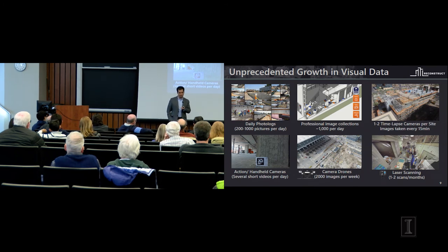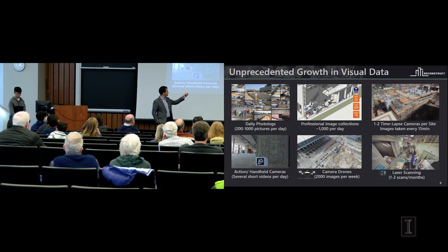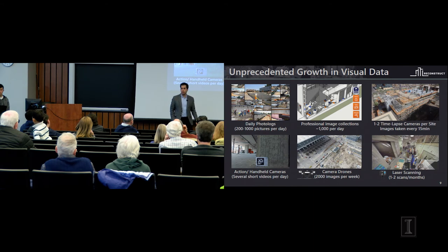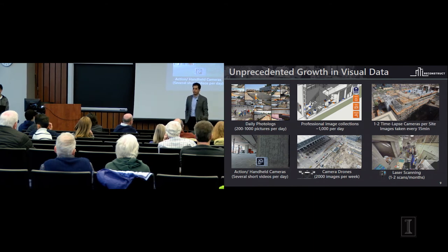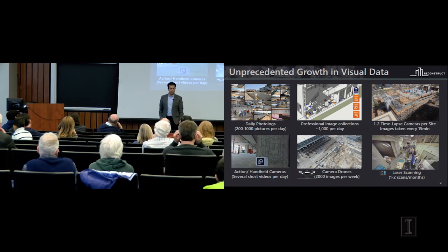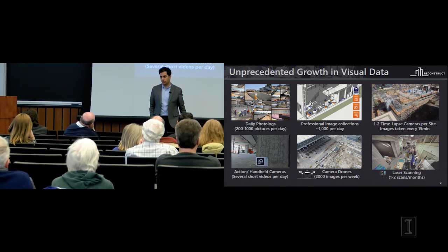It's a great question. So the question is, can this be used in court to make a case about who was behind schedule and the root causes for performance problems? Absolutely, yes. That's one of the reasons that you see professional image collection happening on the job site, because contractors and owners always want to have a visual recording of what is happening on the job site. Instead of thinking about this as a tool that can prevent legal issues, we've been thinking about this as a tool for improving collaboration so we can minimize the chances of going to court.